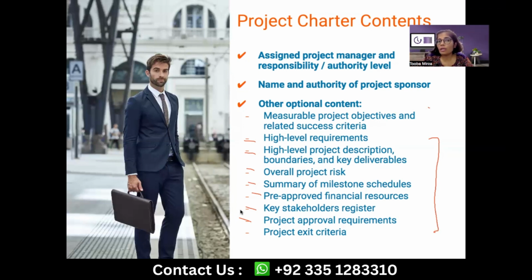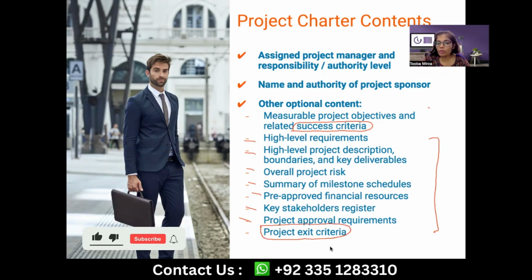So charter is a reference point, a definite input, and a definite document to refer to for project success measurement via these success criteria, and for declaring that we are ready to close the project. How do you think the project moves to the closing stage or the closure phase in the life cycle? Of course, there should be some criteria, an exit criteria, based on which we know that now we are ready to exit from the project or to depart from the project.